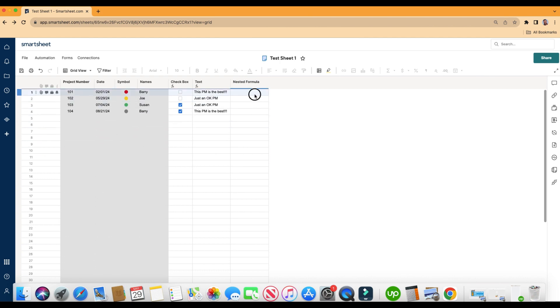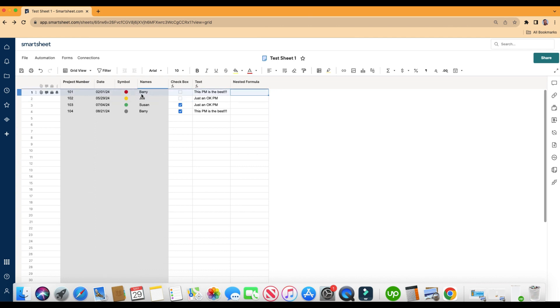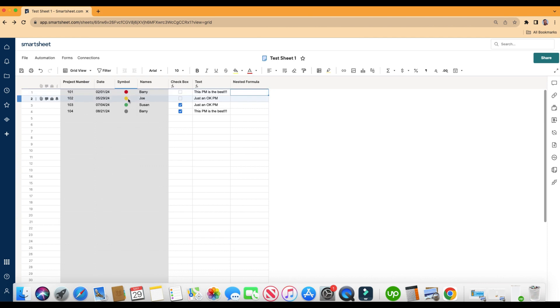The final one we're going to do is an if formula nested inside an if formula. That's right, a formula inside a formula. You're like, Justin, I don't need to know this. This sounds crazy. I promise you, it's super easy to use. I'll take it by the hand, step by step. It's really easy to put in. This is a phenomenal formula to use. I use this formula almost weekly anytime I'm working with a status or a symbol. We're going to use this as a status symbol. We'll do red is late, yellow is in progress, green is complete, and gray is not started.